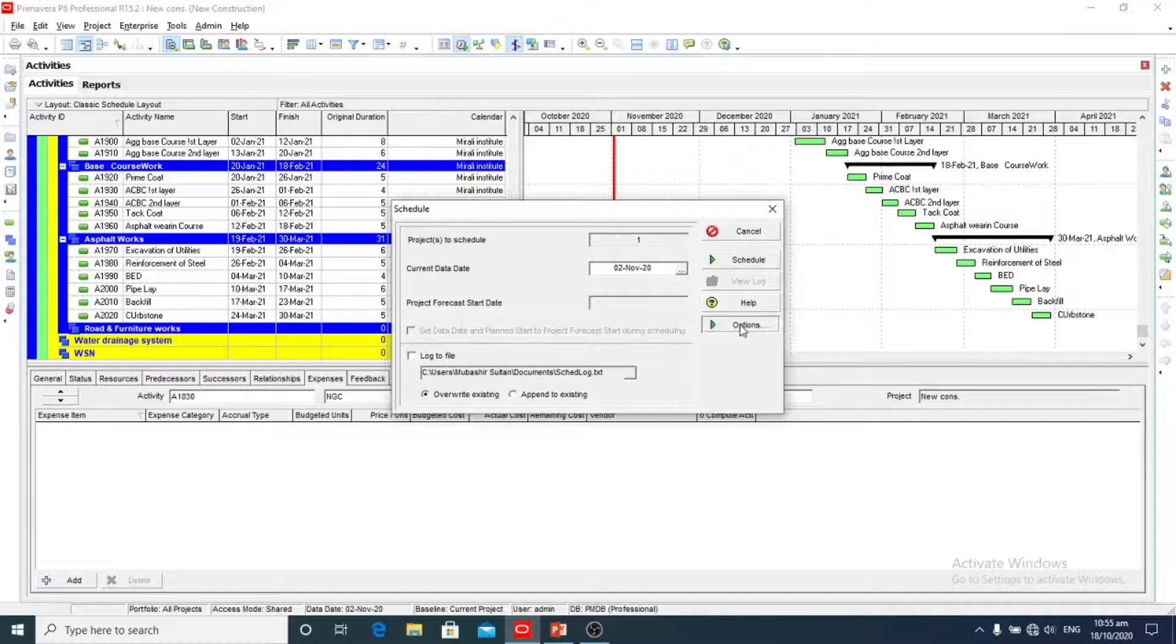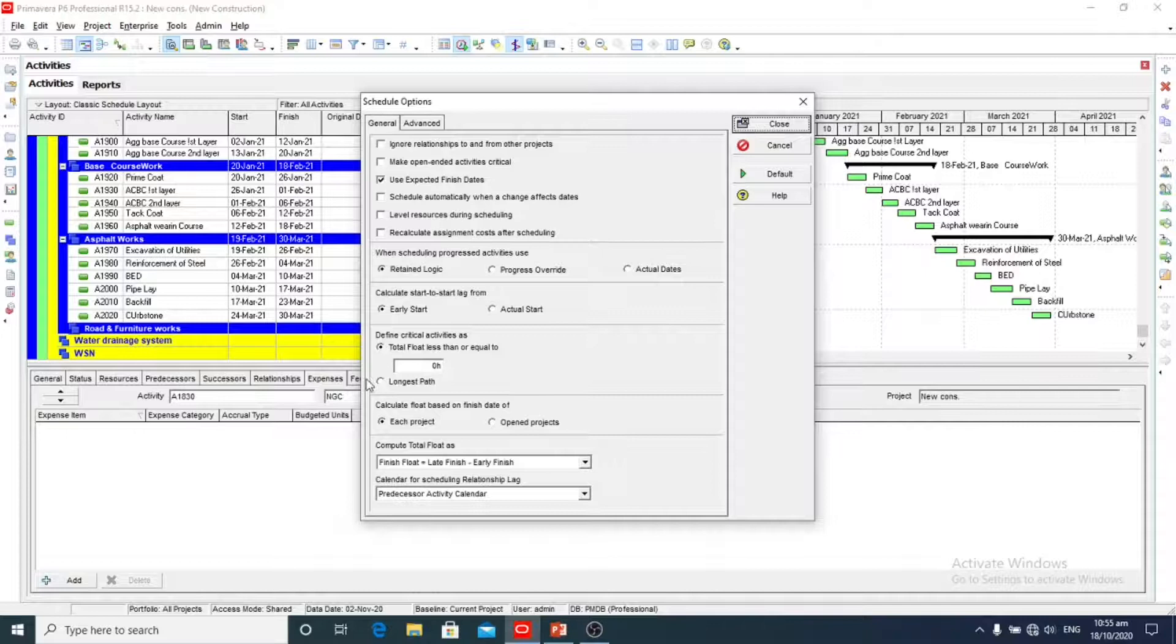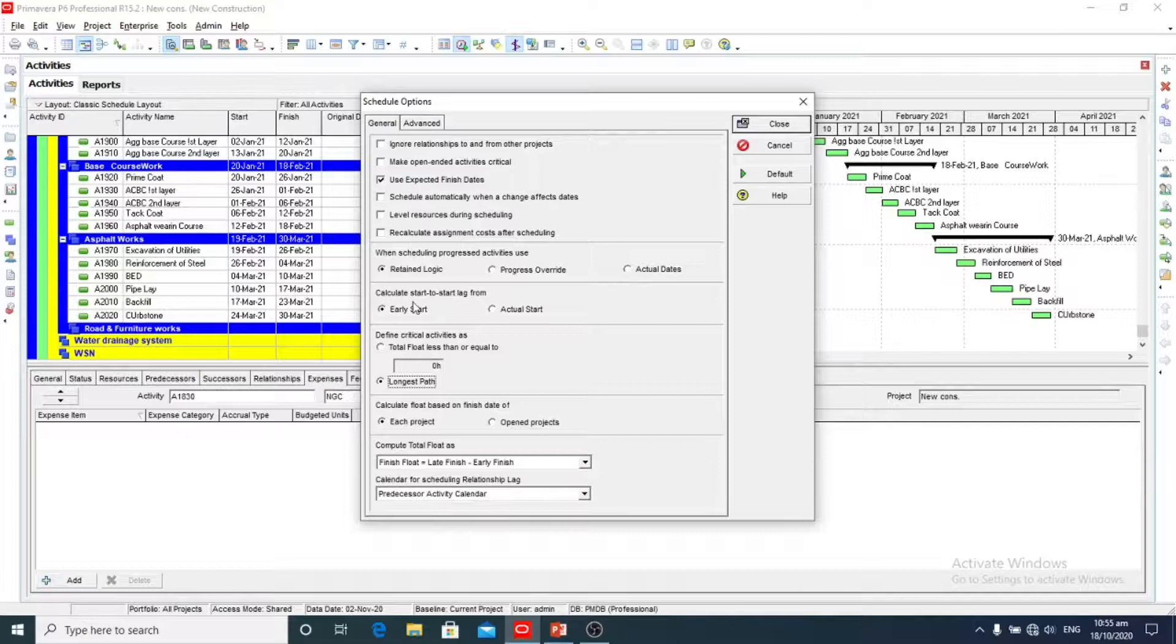Here we will click on schedule. Here is the schedule and options. Here we will change and define the critical activities as longest path. Here are a lot of options.